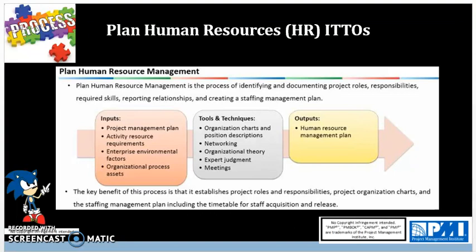Next input is OPAs, organizational process assets, that include organizational standards and policies, and role descriptions along with templates for role descriptions, lessons learned on org structure that worked in prior projects, escalation processes and procedures to handling issues with team resources and within the organization.